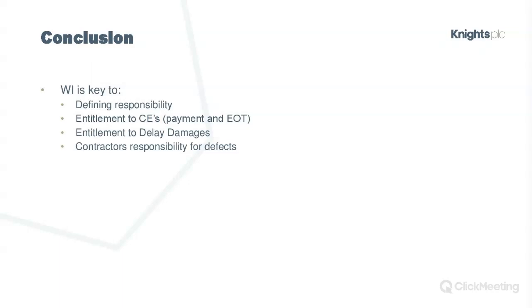Be careful with both about amendments to the Z clauses, particularly compensation event 12 for site conditions, which is often just removed so that the contractor is fully responsible for whatever it finds on site. And do discuss this with the employer at tender stage.